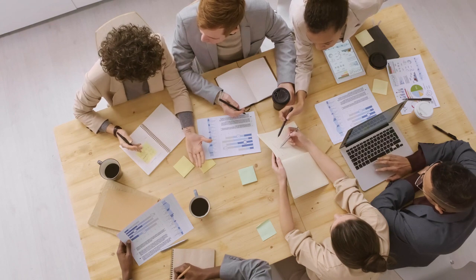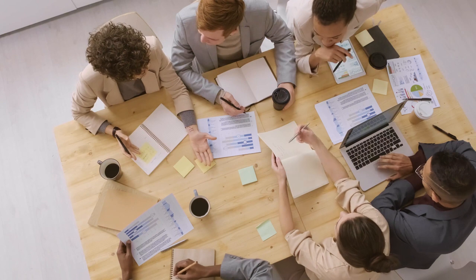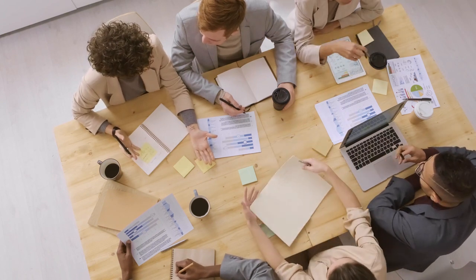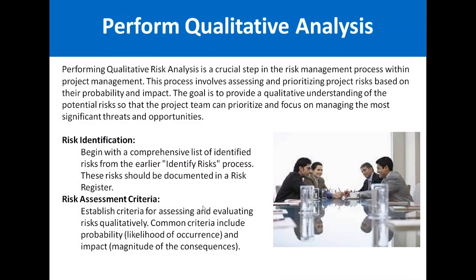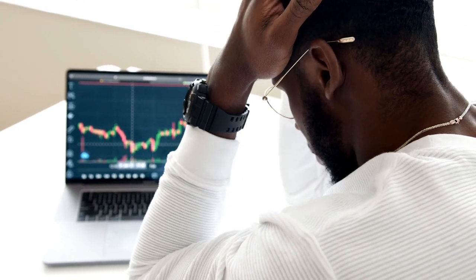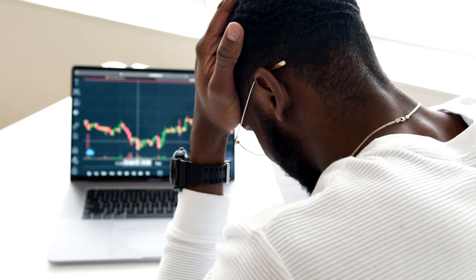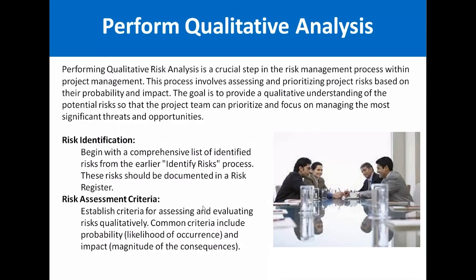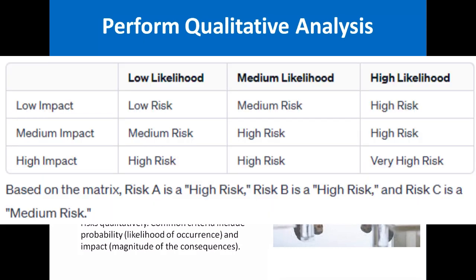Risk means any uncertain condition in a project for which you are not sure whether it will happen or not. If it happens, it may have a negative or positive impact on the project. If it has a negative impact, we have to mitigate it; if it has a positive impact, we have to enhance that impact. Every risk has a likelihood and an impact — likelihood means the probability of occurrence, and impact means the effect on scope, time, cost, etc. Based on probability and impact, we prioritize risks as high, medium, or low.